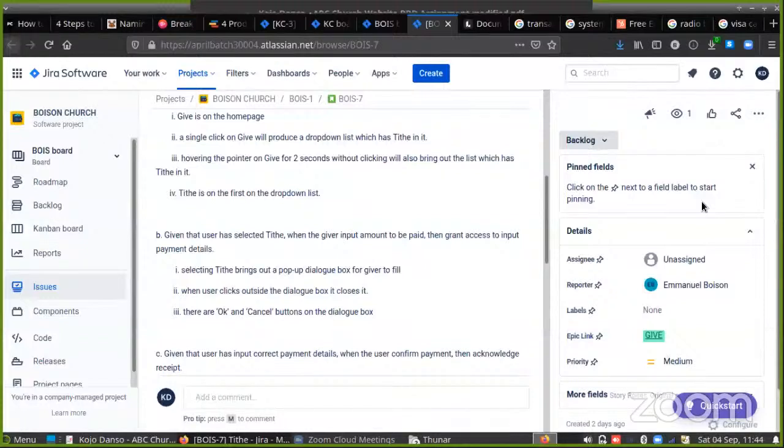Yep, you need a sign off. Always note that or keep that in mind. You need a sign off or approval or the concurrence of the stakeholder before you bring anything to the development team. If you don't have sign off on it, don't bring it over. Don't say this is what it's going to be, the way that we're going to be doing this. No, everything that you see over here, you need a sign off or approval of your stakeholders first. Okay.